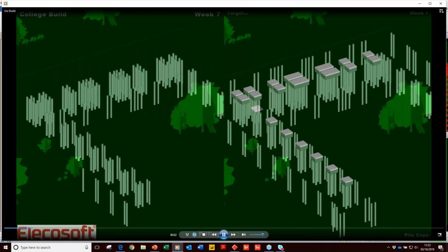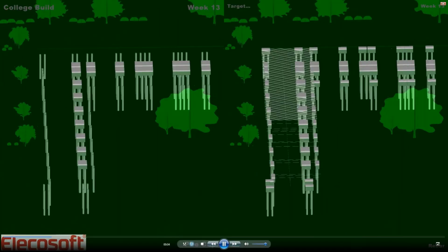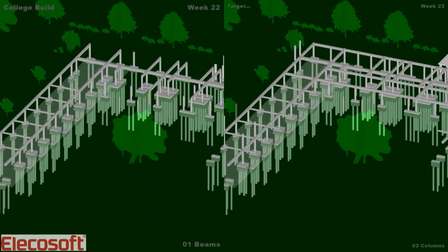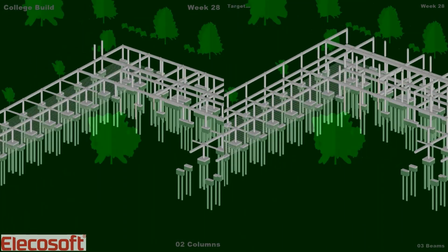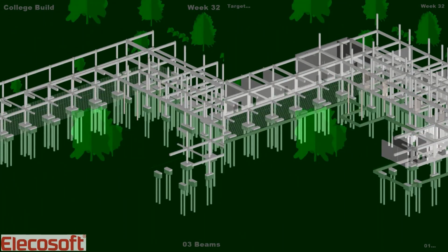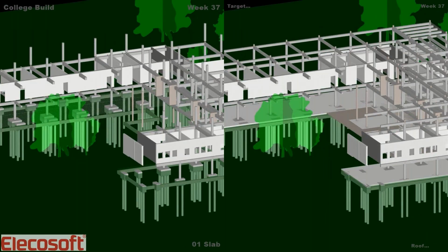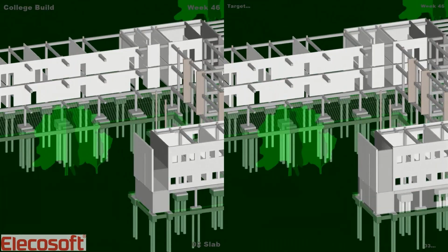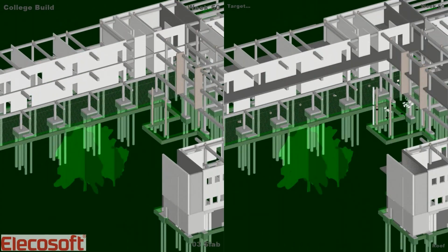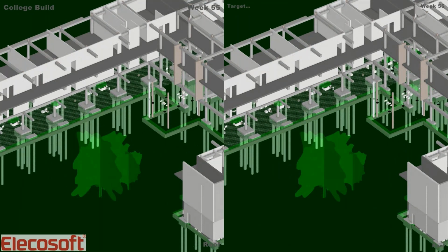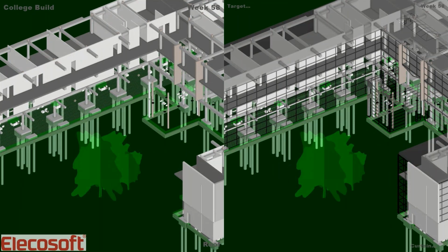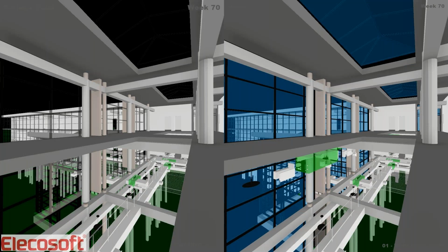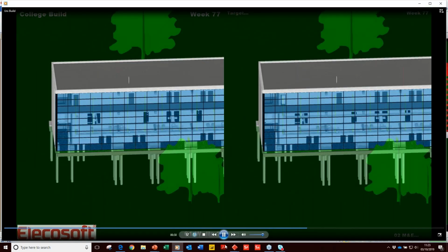You'll see this is the comparison window on the right-hand side. My logo, as it happens, down the bottom. You can see the week numbering's been put into the video file. And so at the bottom is the task that we're working on. Now, clearly we're playing spot the difference again in terms of where are we behind in terms of our live dates and our baseline dates. If I'd chosen to include the red and green coloring schemes for early and late, that might have helped a little bit further with that as well. But those are the sorts of videos we can export.